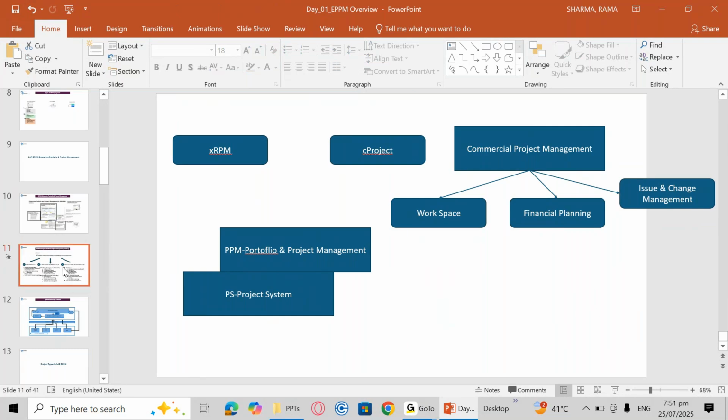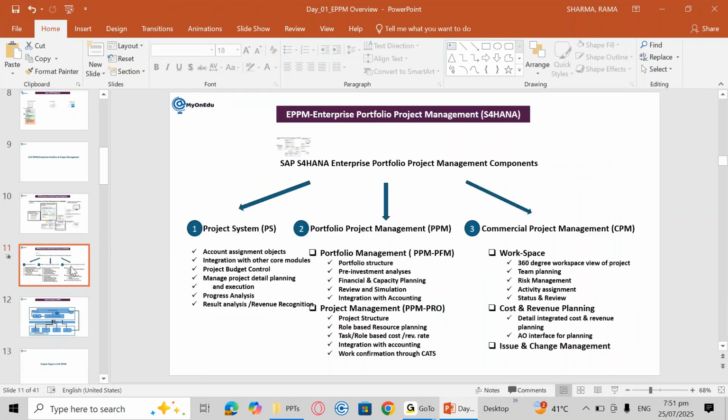Okay, internally financed projects are going to be financed by the organization itself, within the organization. Okay, and externally financed projects have to be financed by the customer. So for internally financed projects, we have two further types of project, where the first is the investment project and the second is the cost project, and third is an external category. The project type is a customer project, where it is going to be financed by the customer. So any idea what is the difference between investment and customer project? Anyone?